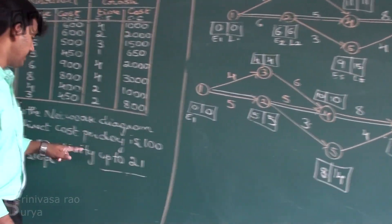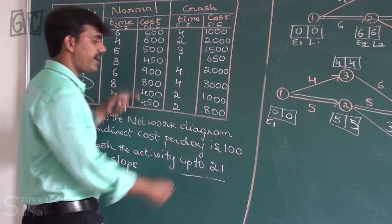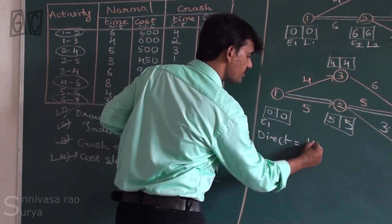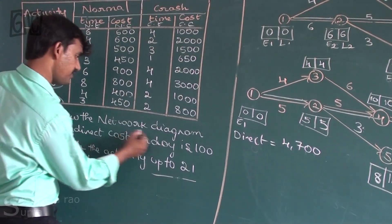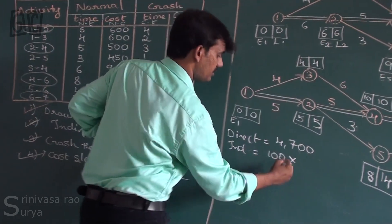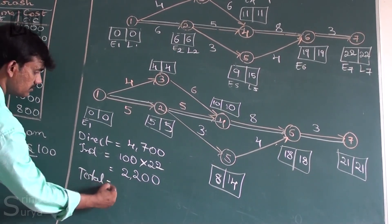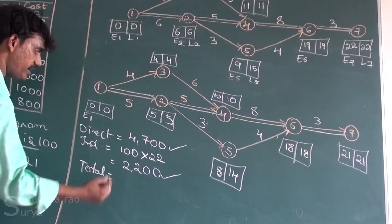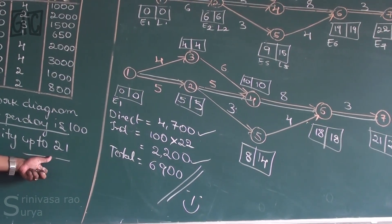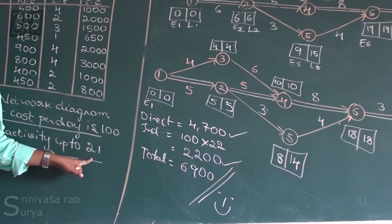We have successfully crashed the activity to 21 days. The direct cost after crashing is 4,700 rupees. The indirect cost is 100 rupees per day times 22 days equals 2,200 rupees, giving a total cost of 4,700 plus 2,200 equals 6,900 rupees. If you need to crash further, take the next minimum cost slope and repeat the process.